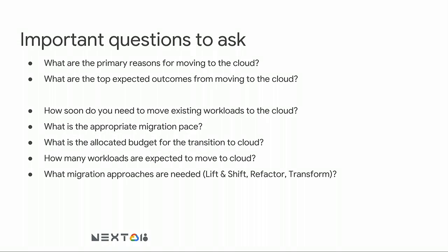And then from a project management perspective, you really want to think about how fast you want to move to cloud. What does that mean from a pace? So if you want to be done in 6 months and you have 2,000 servers, can you actually do that many servers every month? Do you have the capacity to do that, or do you need to look at changing some factor there? What's the budget? That'll tell you, if your plan comes back and tells you that it's all refactoring and it's going to take you thousands of hours per application, you probably don't have the right plan. And then the last couple there are just going to tie into those.